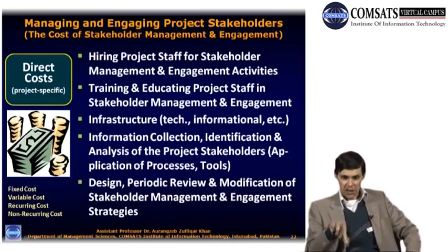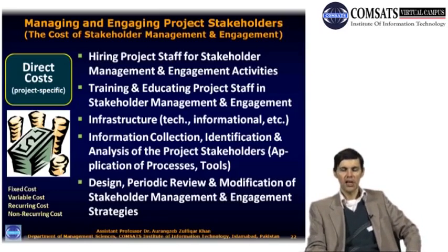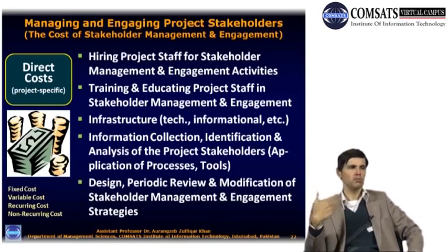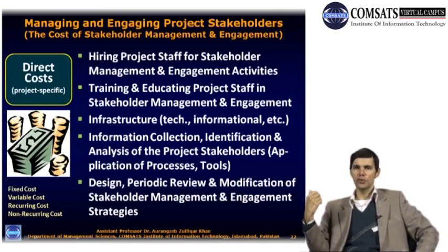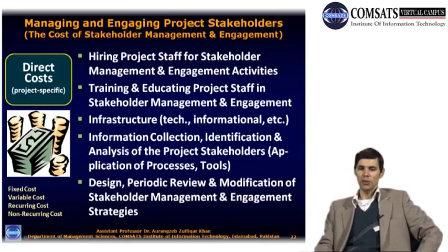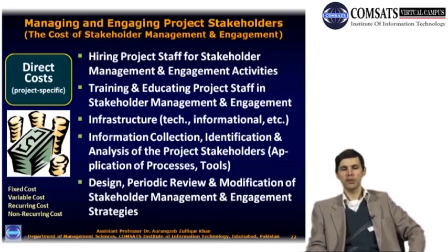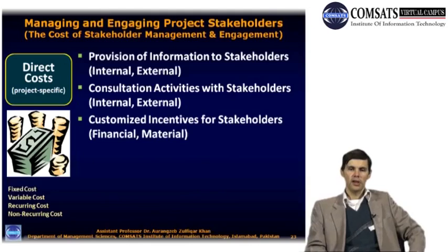Setting up infrastructure within the project, technical, informational, for managing and engaging project stakeholders. Actually collecting information, going out, finding information, different ways of doing it, conducting surveys, conducting interviews, collecting documentation, identifying, analyzing stakeholders, and then coming up with creative stakeholder management and engagement strategies. All these have got a cost with them, but as I said, they also have a lot of benefits associated with them.